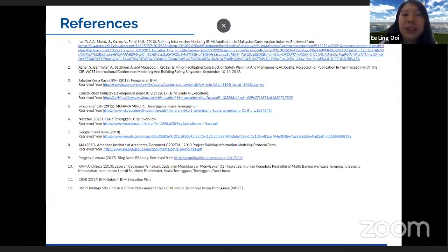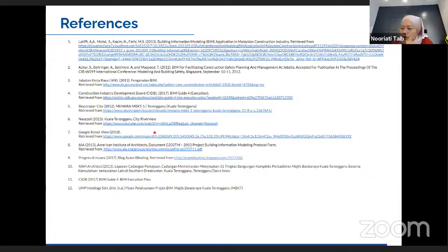I would like to add something that is interesting in our part. BIM was introduced during the early construction phase where there was actually construction work done on site. So the team faced a bit of difficulties in resolving the clash detection issues, where the work had already been done on site, but they needed to go back to the BIM model to amend the model.